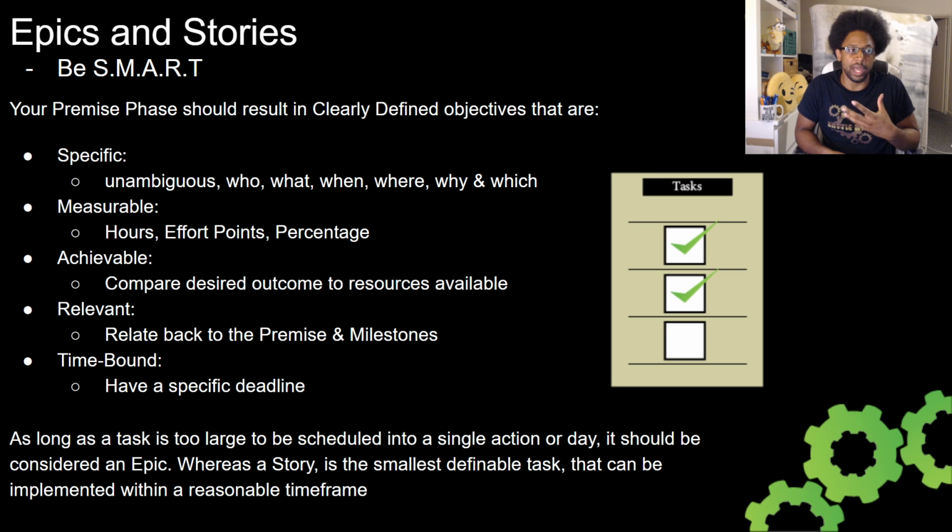Whereas if I was saying, oh, we want to add augmented reality, and the player should be able to access the game by picking up their phone and scanning something, and then using that to send resources to the player in screen, I have absolutely no idea how to do that. I don't know how long it would take to learn. I don't know how difficult it would be. I don't know what software we would need. I don't know what limitations there are. It is an incalculable addition to the project. You can't realistically put that in as a feature if you have no means of measuring it or being specific with what needs to be done. So it breaks the SMART process.